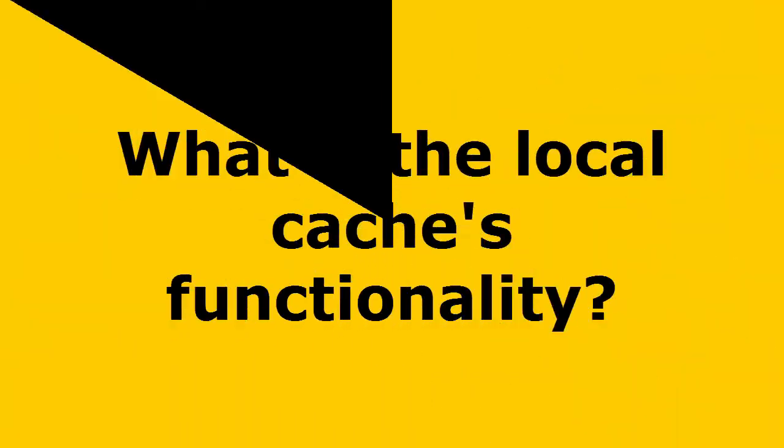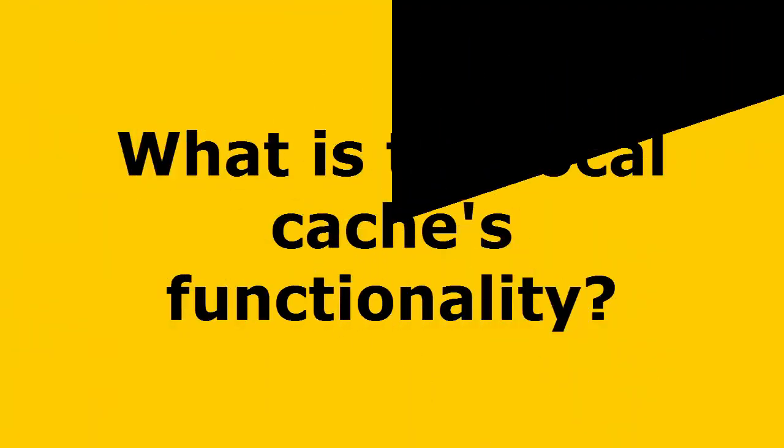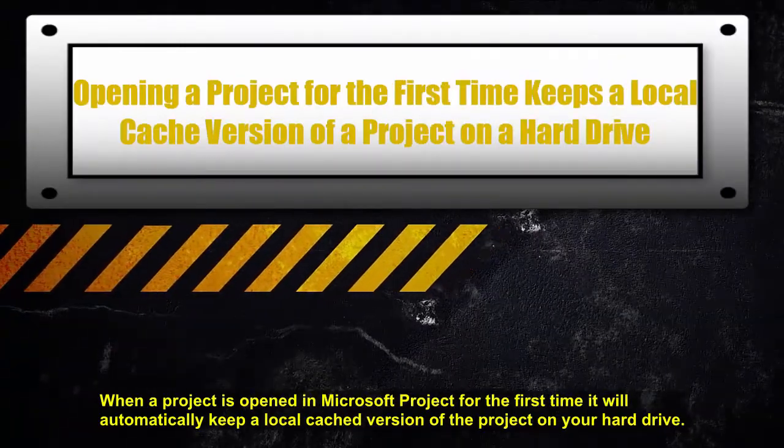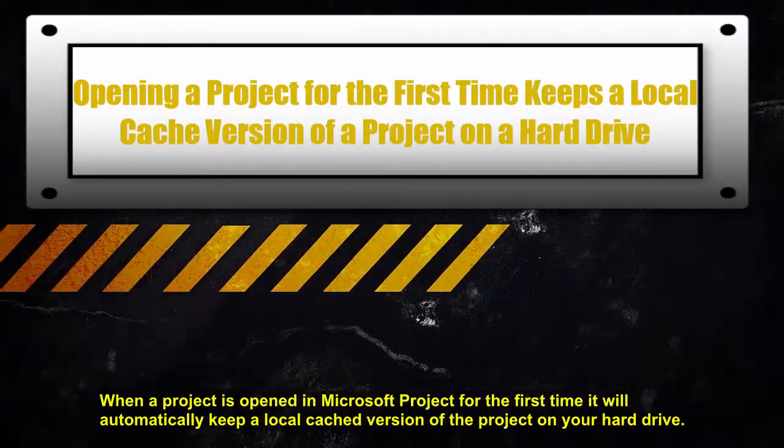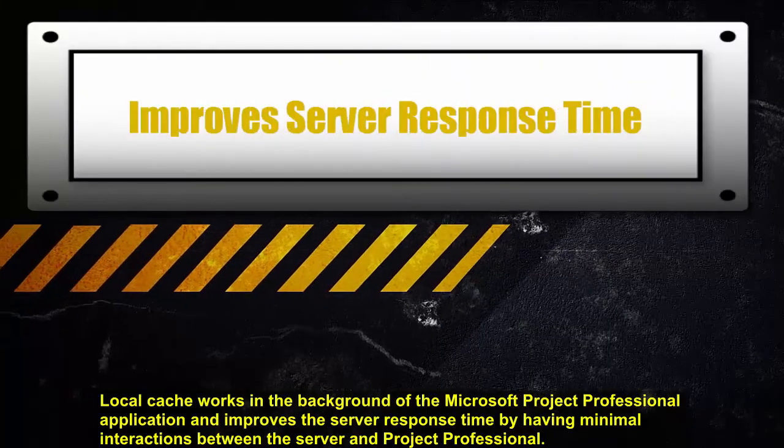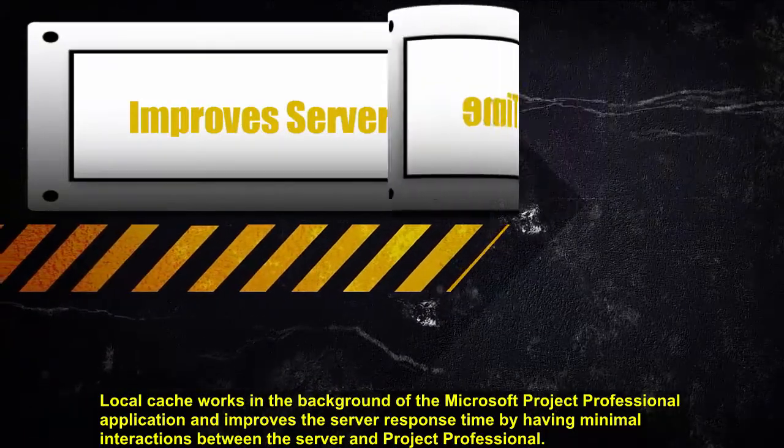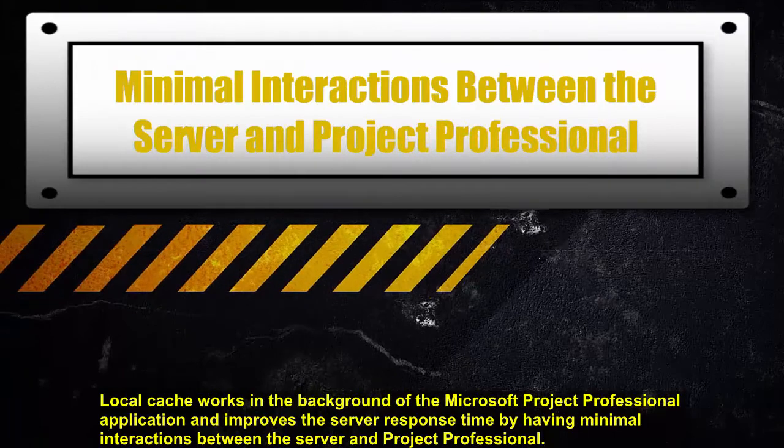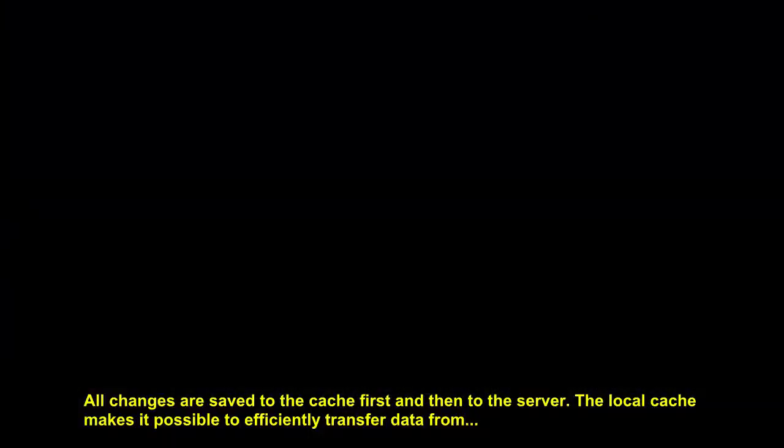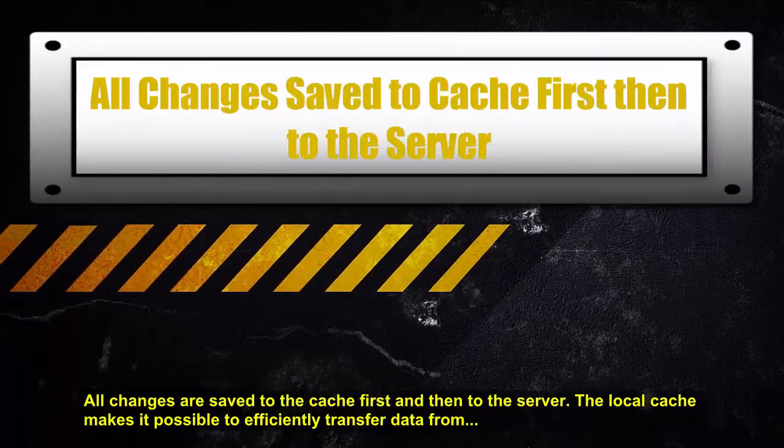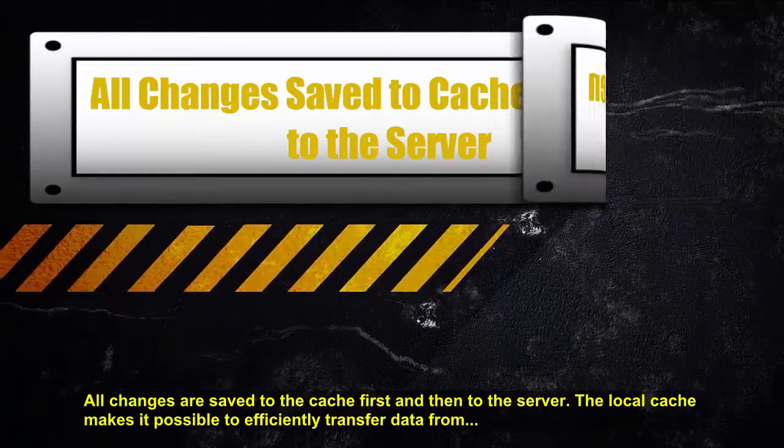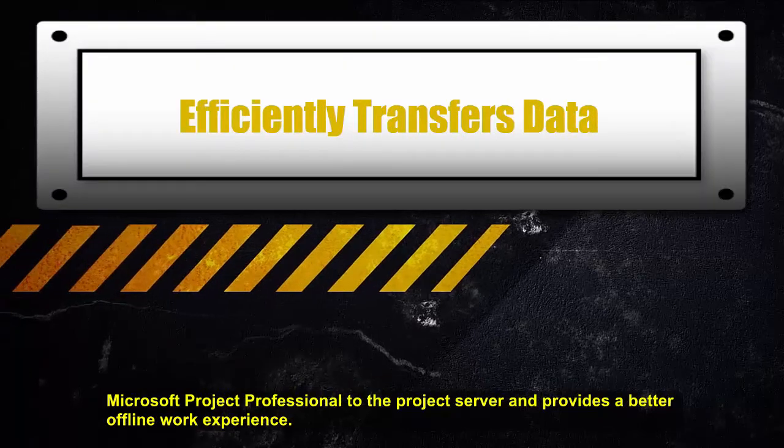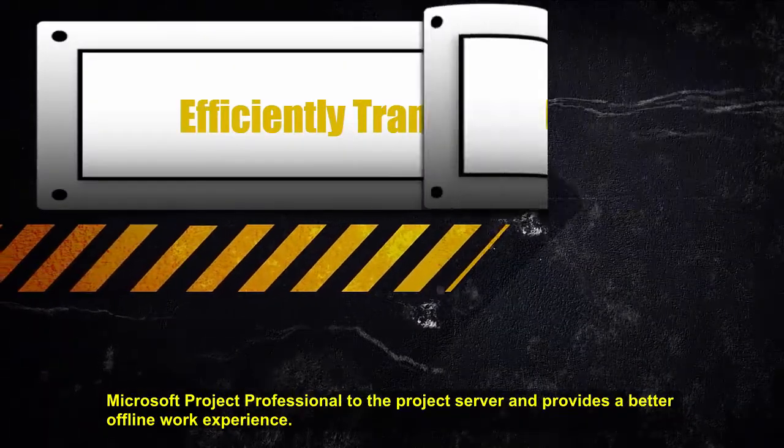So what is the local cache's functionality? When a project is opened in Microsoft Project for the first time, it will automatically keep a local cached version of the project on your hard drive. Local cache works in the background of the Microsoft Project Professional application and improves server response time by having minimal interactions between the server and Project Professional. All changes are always saved to the cache first and then to the server. The local cache makes it possible to efficiently transfer data from Microsoft Project Professional to the project server and provides a better offline work experience.